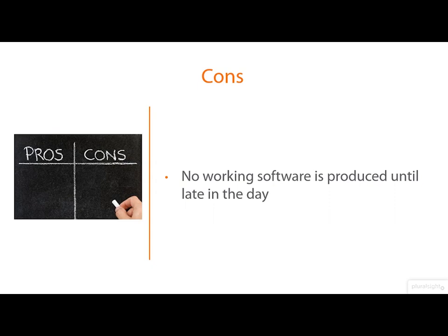To me, the biggest disadvantage of the V-model is that you don't get any working software until late in the process. This means that your end users don't get to see their vision come to life until it is too late to change anything. It can be very hard for non-technical people to be really clear about what they want an application to do, and it isn't normally until they can visualize that application that they can give really good feedback.